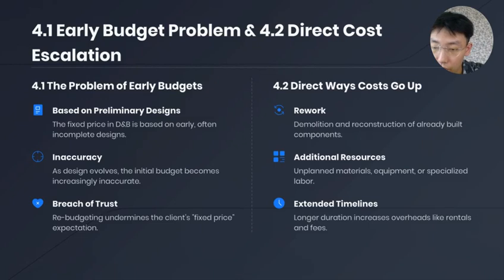Design changes then increase costs directly through rework, additional resources such as materials or specialist labor, and extended timelines that raise overheads like rental and site fees.